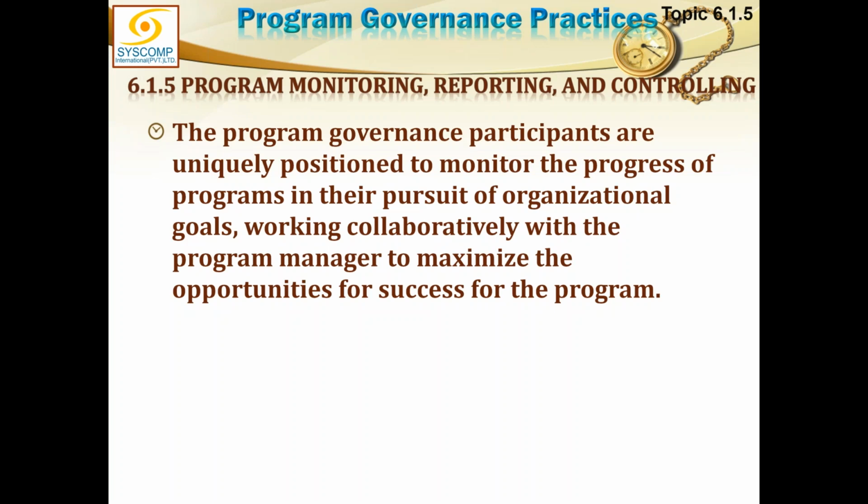No, no. Governance plan is not something that is on a daily basis. Governance plan is one single document created in the beginning, based on the organizational or portfolio governance. But I agree, it can be updated, and if it has to be updated, it has to be approved by the governance board. The program manager cannot update it.